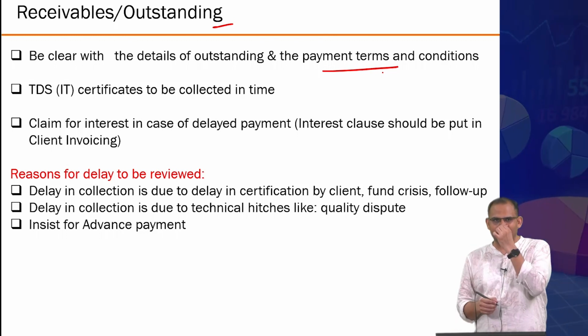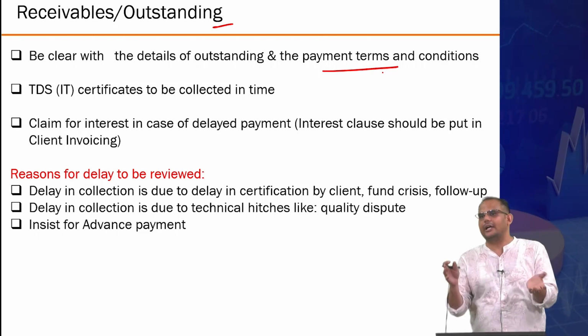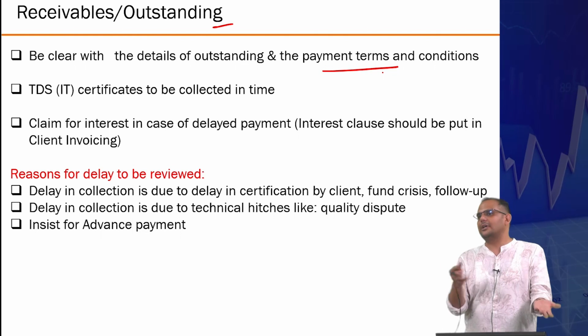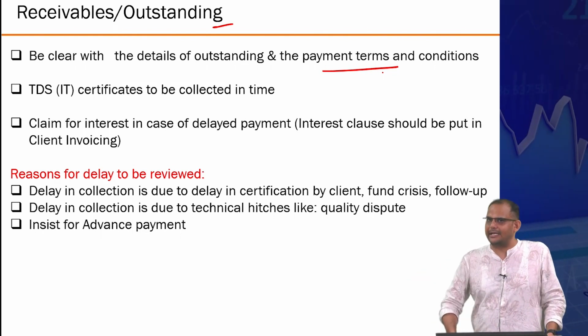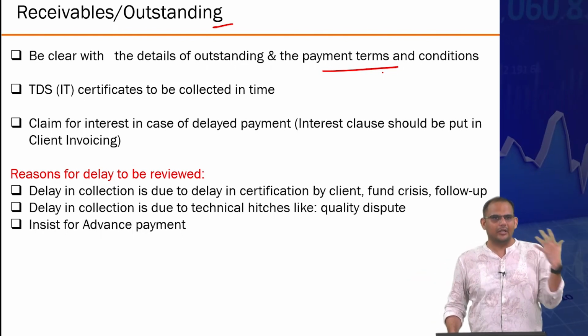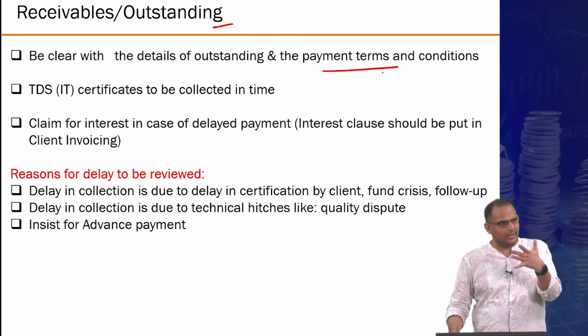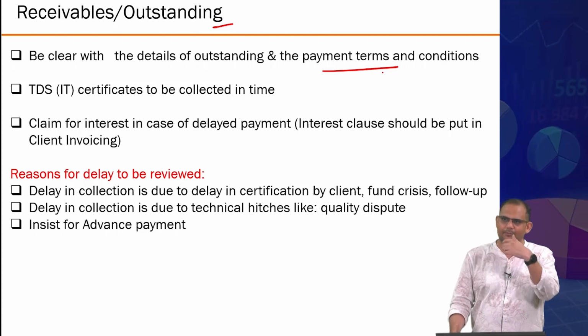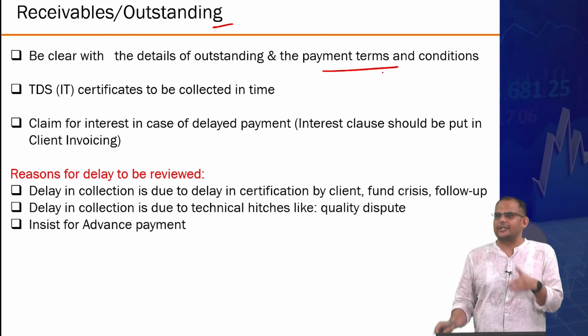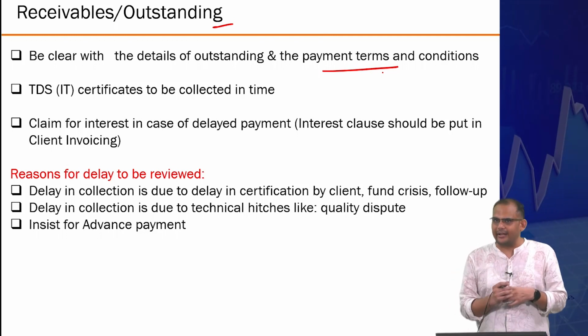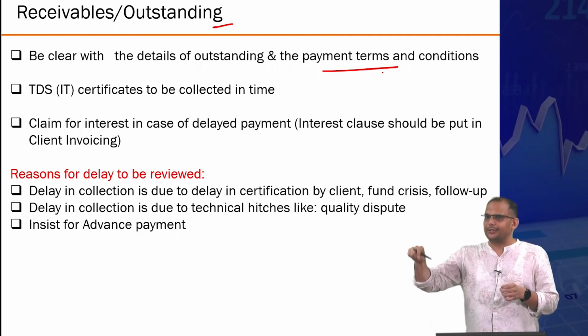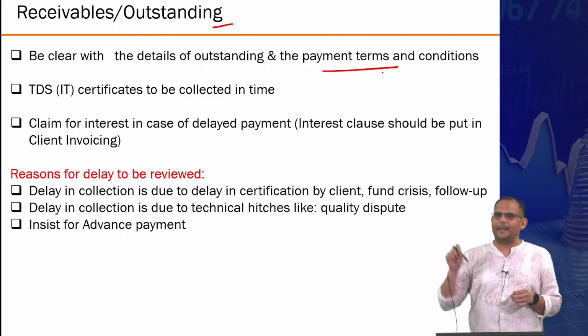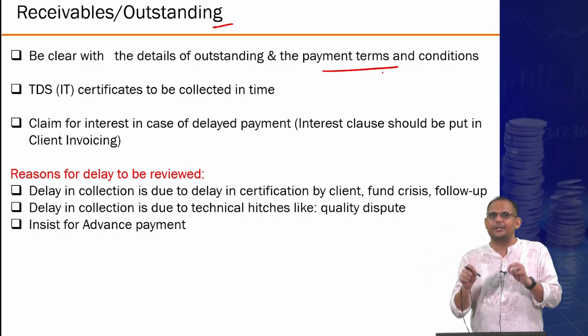A lot of the time it could be that a simple signature was not done on one particular document, and because of that the client did not release the payment unnecessarily, even though you might have done all the work. But the construction industry requires a lot of formal approvals, monitoring, auditing, everything. So as a project manager, you need to be aware of what steps you need to take in order to get this payment released into your account.